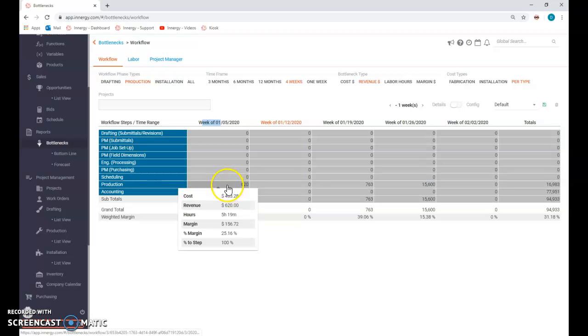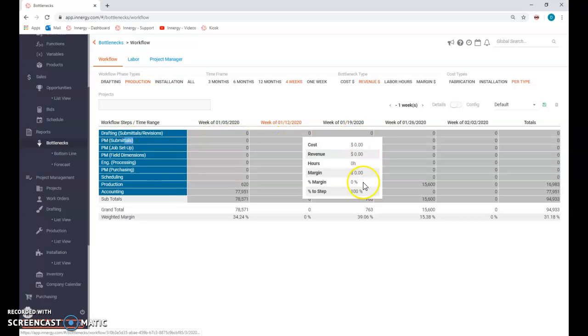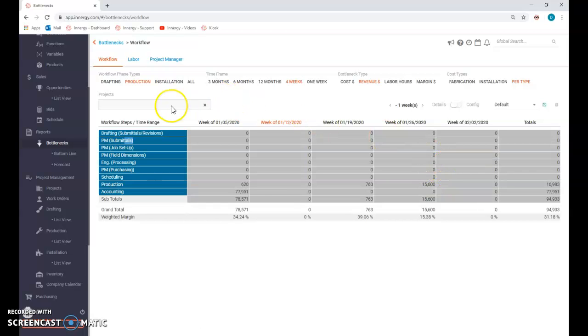Now, right now, I know that that's not entirely accurate. Much of this is not accurate, but our goal is to use this as a tool to help us plan for staffing, plan for production moving forward. Know that, hey, we see these submittals. Well, we're going to be way overloaded on submittals, so we better start outsourcing, better find some other engineering options. Dan needs to free himself up in accounting or in purchasing or whatever so that he can do some drafting next week, things like that. I need you guys' help doing that, so it is important to keep the dates up to date.